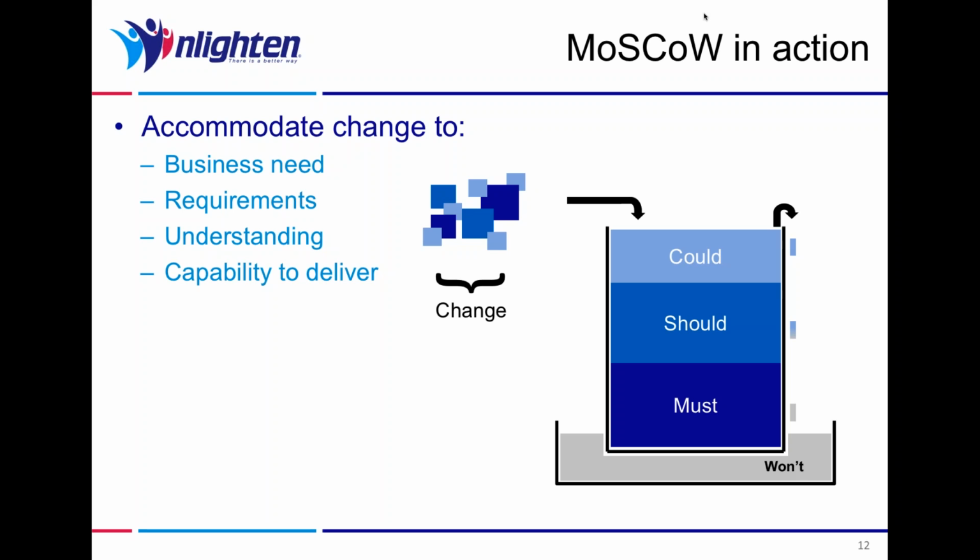You know, these are your requirements, your priorities. Where does it fit? And he looked at those and said, well, actually, looking at all the should-haves that are there, they're all more important than this requirement that I've just brought to you. Okay, so that will make it a could-have requirement then. Let's have a look at the could-haves. Oh yeah, it's definitely more important than those things.